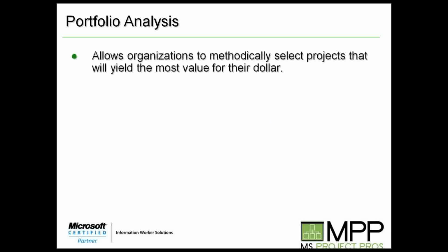So the first thing is around the selection of projects. We want to be able to see projects that are in the system and do some weighing against them and make some selections. If we have these different proposals in the system, and a new proposal comes down the wire, say a software development project, I've got to be able to look at that and say, is this something I should move forward with or not? So I've got to go into my existing set of projects and see where I'm at, see if I can actually add in a new project based on the type of project it is. Do I have enough money to push it through? Do I have enough resources to handle that?